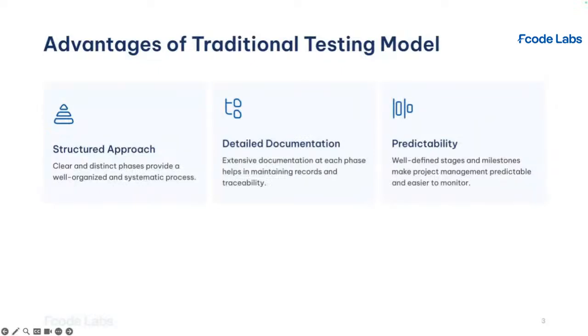Today, most teams are following the agile methodology. The problem with the waterfall method and the software development life cycle in the traditional methodology was that they were not ready to accept change. If a change should come, it should come at the very beginning in the planning phase. But if changes come during the development phase, they have to wait until the latter part in the maintenance or until they start a new complete cycle. This is not valid to today's practices.